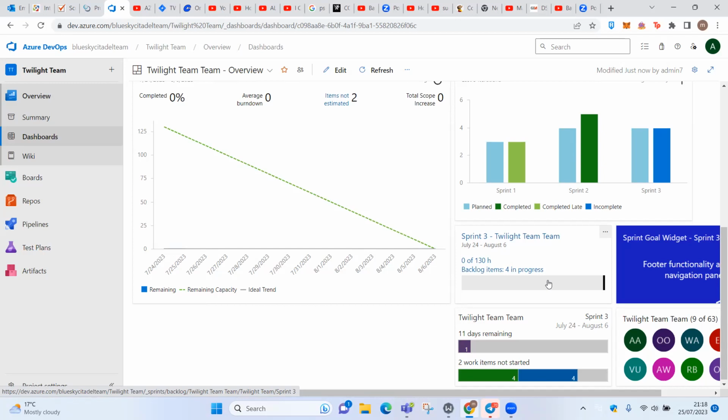So if I'm looking at this little chart, I'm saying, okay, they have 130 hours. We're in the second day of sprint, and they've not done anything, but you've done something. But because they didn't record the hours it took them to do the task they've done, we can't see anything on that chart. So when you meet with them tomorrow, you need to tell them, once the QA starts creating their story, that they need to estimate their task in hours.